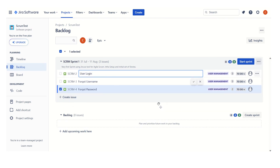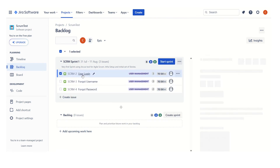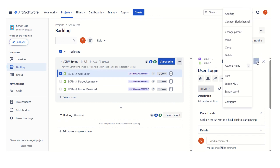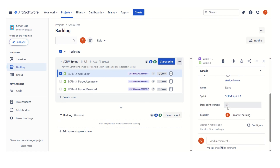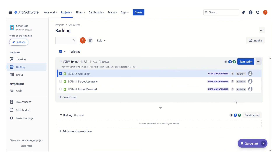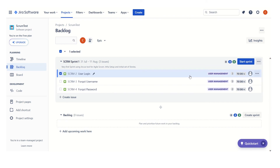If we click on a user story, we can see that the story point estimate is listed as three. This number is what we used and it is displayed as the story point estimate. An important thing when doing sprint planning: whatever user stories we have added to the sprint backlog and the story points assigned to those planned stories — the total sum of story points will be shown here. Right now we have three user stories: 'User Login' at three points, 'Forgot Username' at three points, and 'Forgot Password' at two points, giving us a total of eight story points.